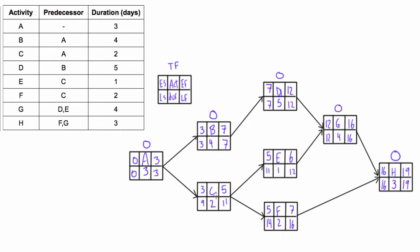Activity C: the total float would be 9 minus 3, that's 6, or conversely 11 minus 5 is also 6, so C's total float is 6. Activity E: 12 minus 6 is 6, or 11 minus 5 is 6, so its total float is 6. Activity F: 16 minus 7 gives us a total float of 9, and you can also verify that with 14 minus 5, which also gives 9. By inspection, each node with a total float of 0 forms the critical path — let's outline it here in red.